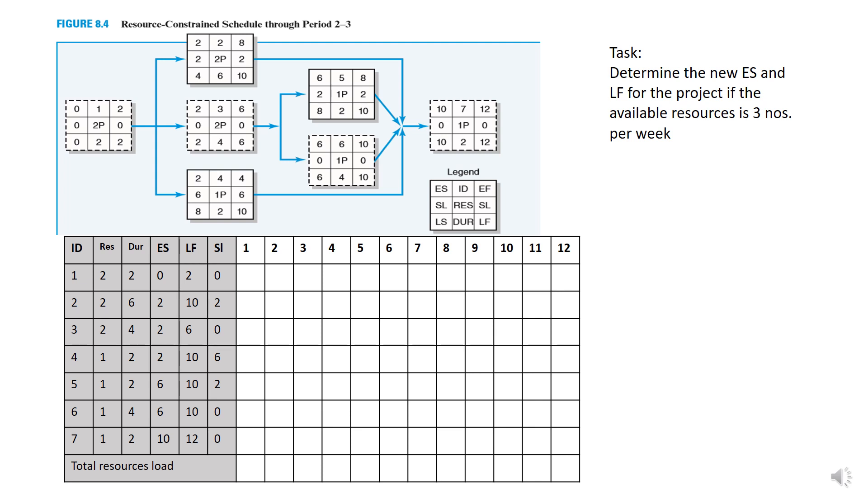If you notice, only early start and late finish is the two primary information required and late start here is referring to float. The horizontal bar here refer to the time. So in this case, it is week.